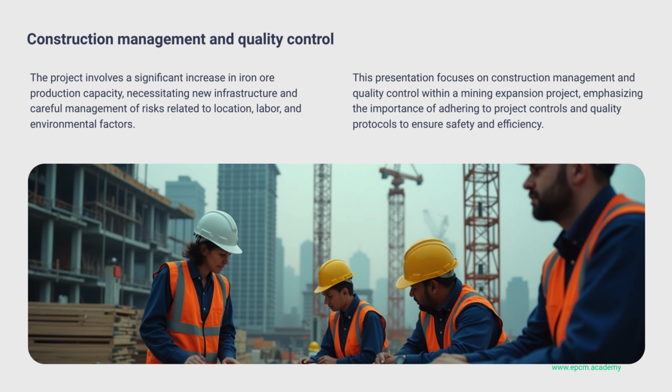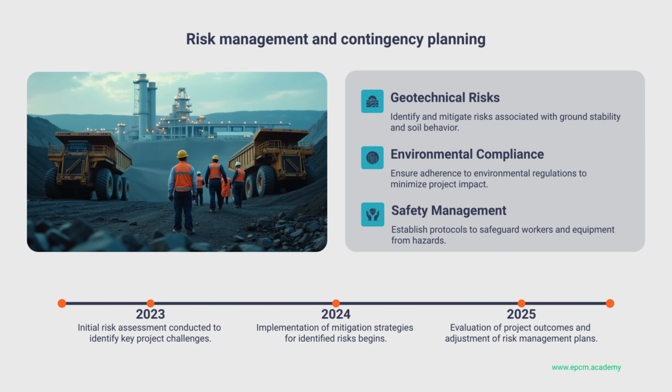It is. And they need to assess the potential impact of these risks, not just identify them, but really understand how they could affect the project. They suggest using quantitative risk analysis techniques, things like Monte Carlo simulation. This allows them to model different risk scenarios and see how those risks might impact the project's cost and schedule. So it's not just about saying, okay, this risk might happen. It's about quantifying the potential impact so they can plan accordingly. It's a much more proactive approach to risk management, and it can save a lot of headaches down the road.